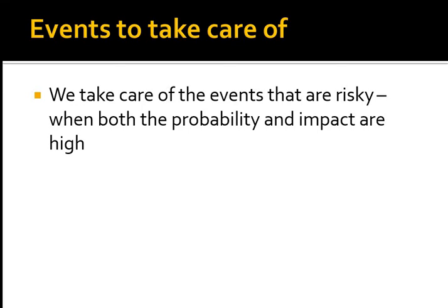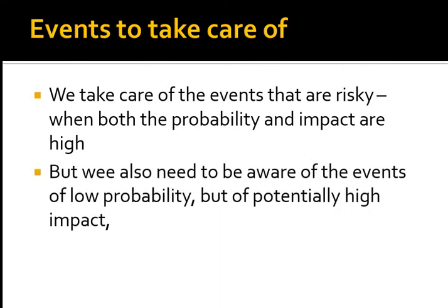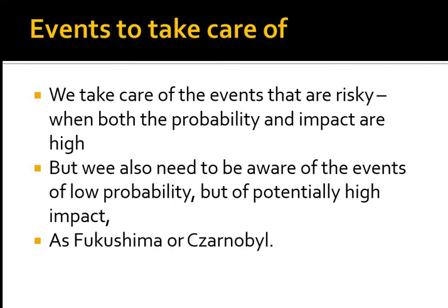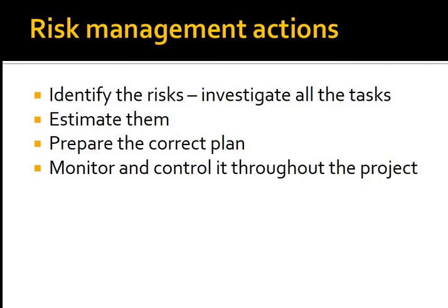First of all, if the multiplication of the probability and impact are high, then the factor is going to be important for us. Sometimes there are also things of quite low probability, but they are still very dangerous, and we also need to take them into consideration. We need to pay special attention to them.